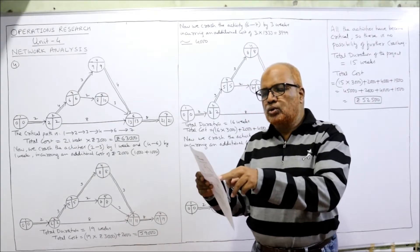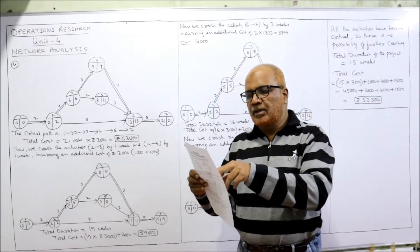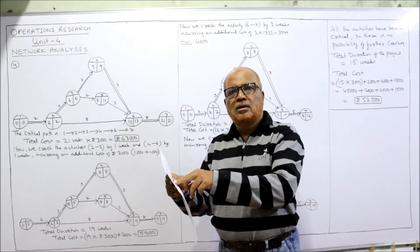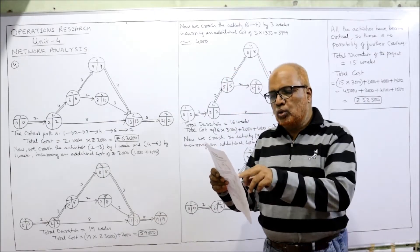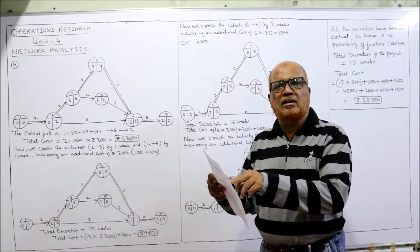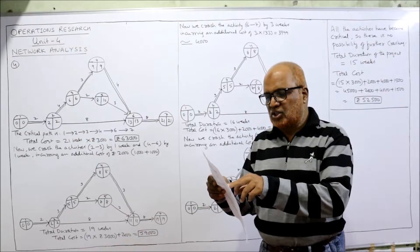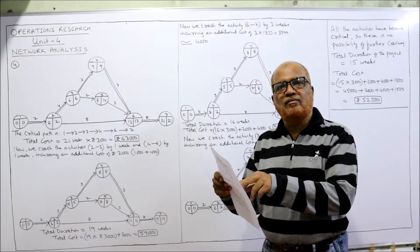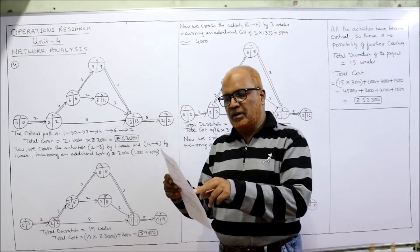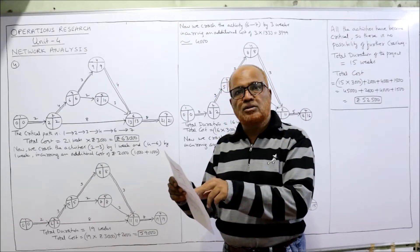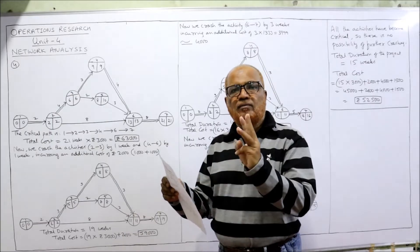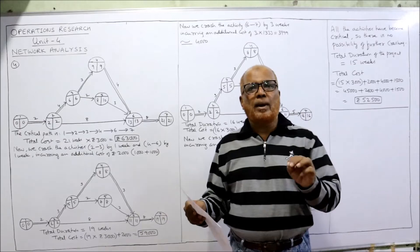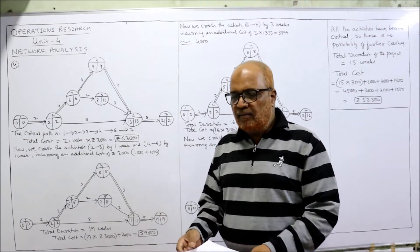For activity 2→3: normal time 4 weeks, crash time 3 weeks — we can crash 1 week at an additional cost of 1000 rupees. For 2→6: 8 and 8, no crashing possible. For 3→4: we can crash 1 week at an additional cost of 1500. For 3→5: 2 and 2, no crashing possible. For 4→6: 4 and 3, 1 week possible. For 5→6: no crashing. For 6→7: normal time 8 weeks, crash time 5 weeks — 3 weeks can be crashed at 1333 rupees per week. The indirect cost is 3000 per week.